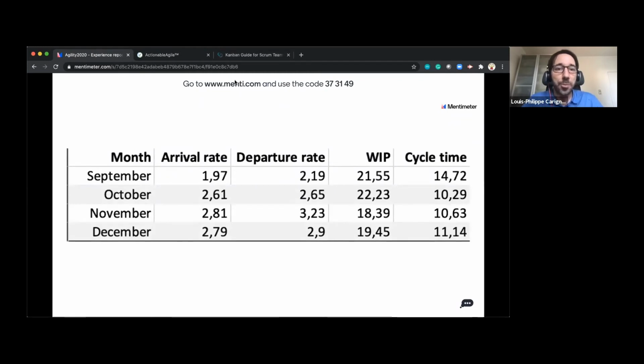So what happened in that fall? Again, for that same team, by just limiting the work in progress in the ready column, well, their WIP started going down. Cycle time started to go down. And oddly enough, as things were going faster, if you look a little bit at the arrival rate and departure rate, it's starting to increase. So I went from like this, squeeze the lines like this, and then the line started going up like this.